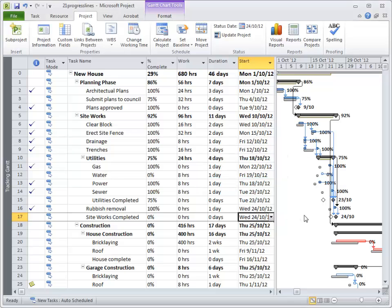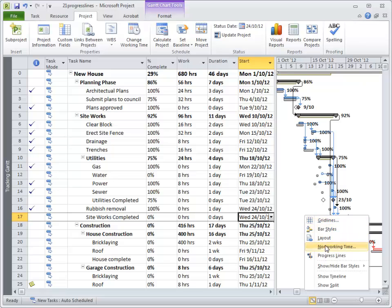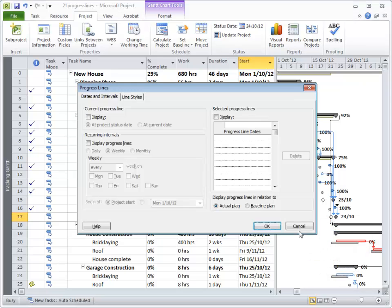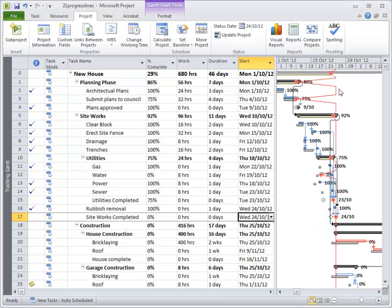Nothing's happened so far. I now right-click on my Gantt chart and choose Progress Lines. Then I choose 'Display at Status Date' and hit OK. And what you'll see here is this red line down your page showing you where everything is slipping.